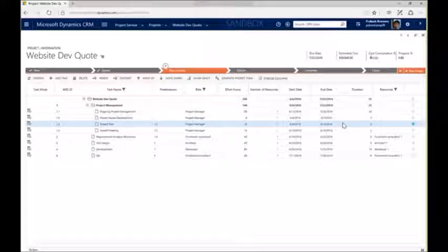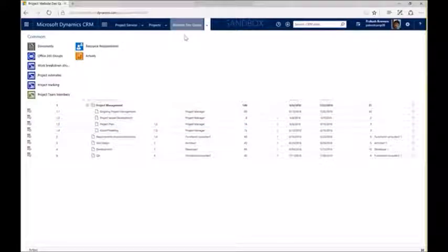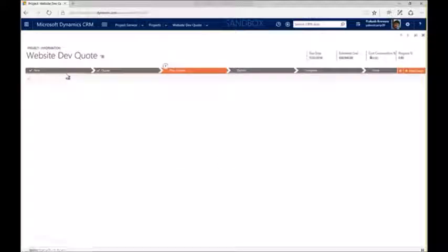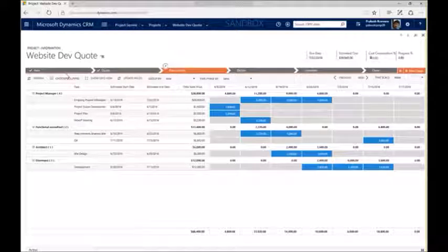Now, if you remember, I applied a certain price list to this that had rates. This is a T&M project, so I have billable rates for this client. Okay? So now let's switch to our estimate view, and that just takes this work breakdown, applies that price list, and then time phases this revenue for me, this projected revenue, so I can see how this estimate would flow week by week.